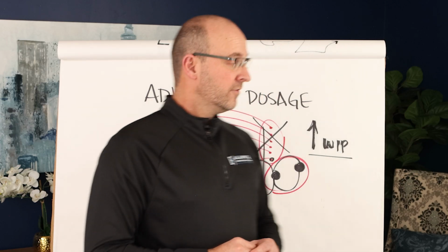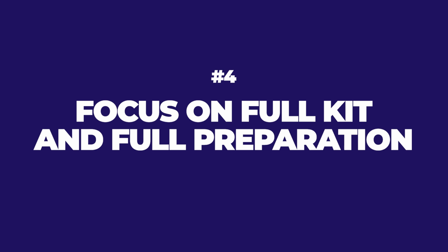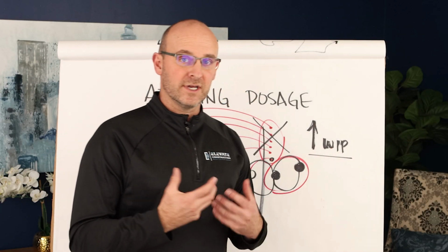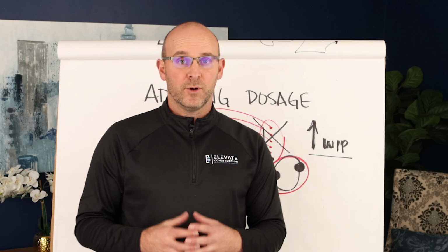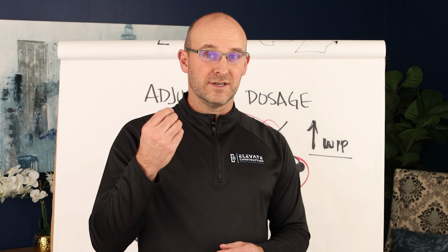And number 4, for these tasks that you might have out ahead of you, focus on full kit and full preparation, and make sure that when you have items that are in queue, that preparation is happening so that when you do get there, part of the additional focus and the additional dosage is the preparation that has already been done.